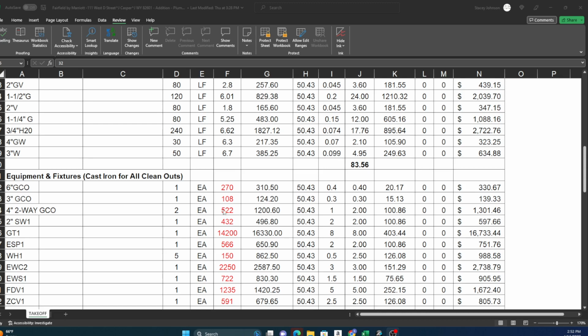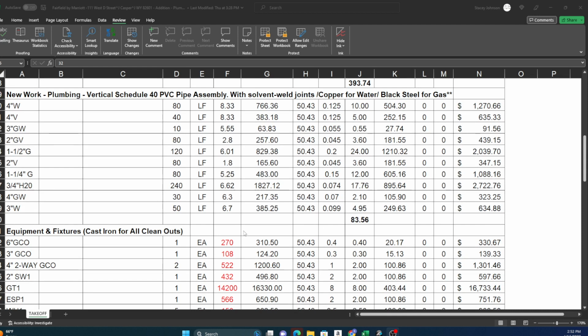So let's talk about, if you're the plumber, this is how you're to think about your trade in terms of time. You have your rough ends, right? Which is typically the things that are going to go underground, and then you have your finish plumbing, your finish stuff. Once everything's in, basically that's what you finish it with. So when we're talking about plumbing, you have to think that your rough end portion is all of your vent, waste, all your underground pipe, everything that goes underground until it pops up from the foundation.